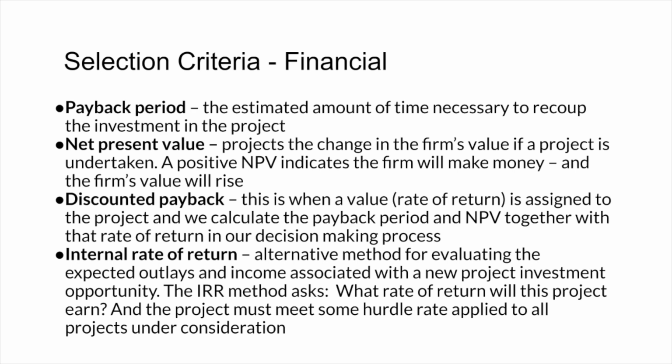We could also think about the net present value. We use the time value of money to determine what is the present value of all of the flows of funds that are planning to come from that project. Is the money that we're putting in now, will it be replaced or covered off with the revenues that are going to flow in the future?